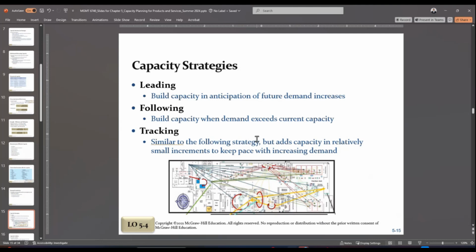So again, I have to work on buying a new area, or real estate, or maybe lease it and start working on these. And again, doubling is a big cost involved. I definitely know some of these machineries were worth 1.2 million. And to buy something that high, you need to start your efforts at least 6 months ago.